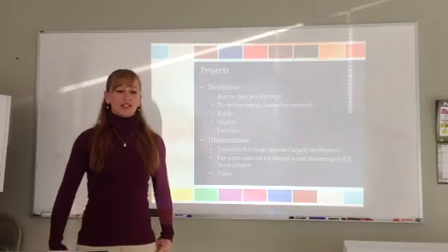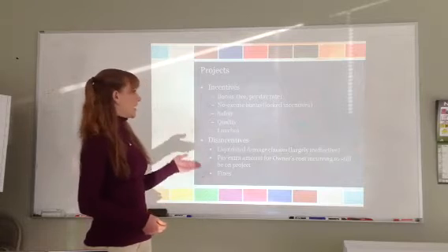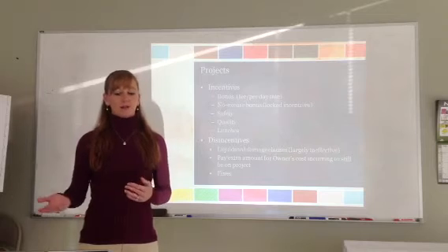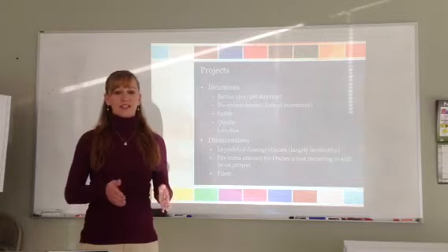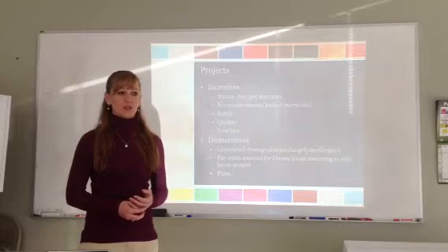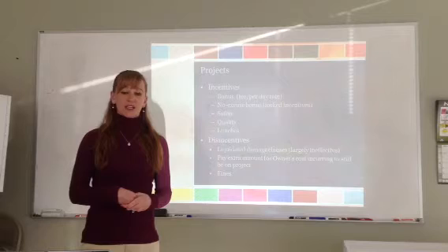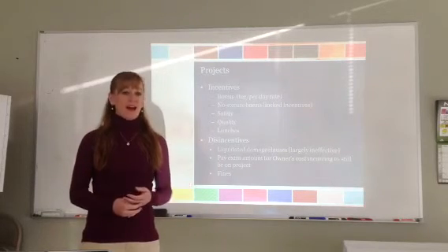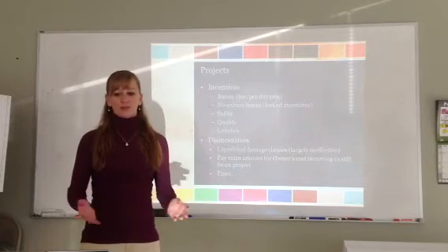When you're looking at projects, as I mentioned, there's incentives and disincentives. Some examples of incentives are a bonus. Does the contractor get a fee, a percentage, at the end of the day if they complete early, or is it a rate per day? There's a no excuse bonus, so they're locked into incentives as I discussed earlier. You can also provide incentives to the subcontractors for safety and quality. For instance, on the project I'm working on right now, we provide a safety subcontractor of the month, and that subcontractor receives pizza one Friday for all of their crew.